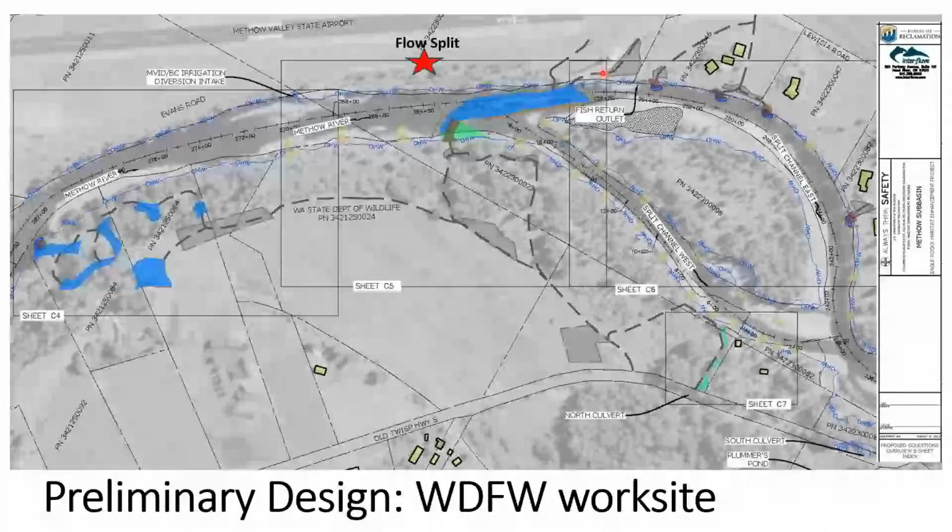indicating the location. And we have some complexity structures in the left, the split channel east of the left side as well. We looked at doing additional complexity in the split channel west, but determined that basically the cost value wasn't there. There's already some really good complexity through there, and the impacts both to the river and to the riparian zone would make it so it wouldn't outweigh the cost.